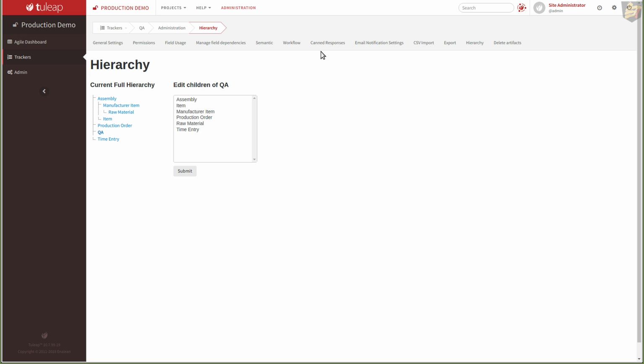So one activity that we would define inside of SAP and inside of Tulip would be to get the work permit in order to install the item. Another aspect would be to set up an activity to assign the installer the information in order to install the sign.